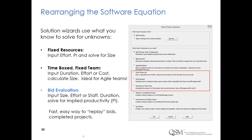Early estimates often require combining what we know — often very little — with reasonable assumptions about what we don't know. The software production equation can be rearranged to provide different estimation approaches: fixed resources determines how much functionality or scope over a given time; bid evaluation calculates the productivity needed to build certain functionality within a certain time and effort, used to determine feasibility of bids and benchmarking; time-boxed fixed team calculates the delivered size given a specified amount of time, effort, and productivity.